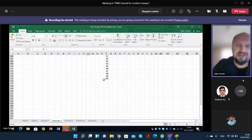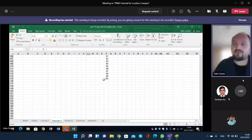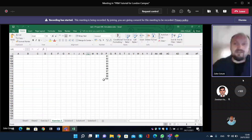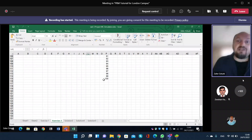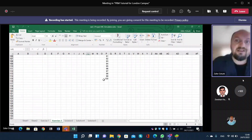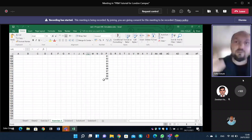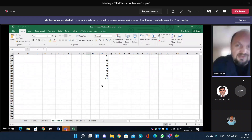Imagine we are doing this before starting the project — trying to assume the project length even before we started. We already calculated that task A will take, say, 7 days, or task B will take 10 weeks, but obviously there are some expected delays and variations. Now we are trying to observe all possibilities that might happen and get an outcome from all those possible actions. Any combination of those variations altogether, we are trying to approximate a single value. We did it in this example with 100 simulations.